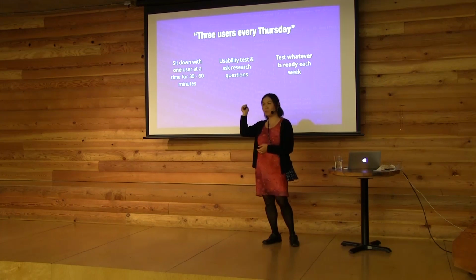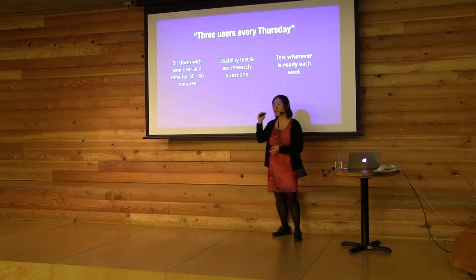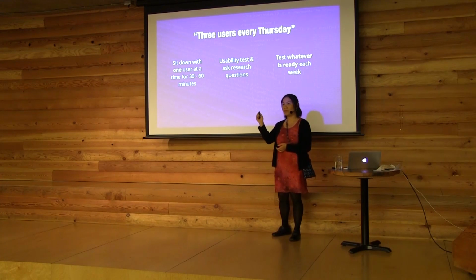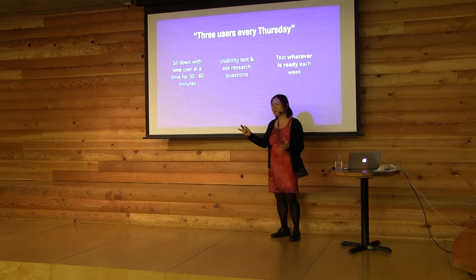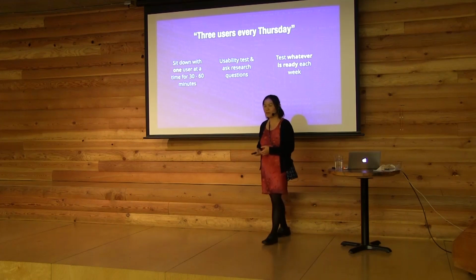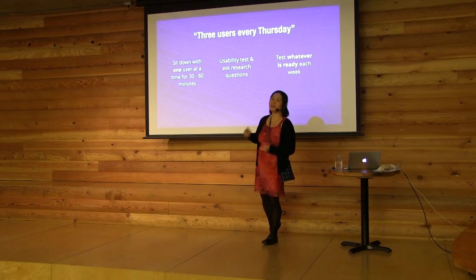And what the Lean UX book suggests is to outsource the recruitment of users, because that's the hard part. It's really hard to design and get your design team working on something, and also be dealing with the logistics of getting people into the office or on a WebEx session or whatever. So they suggest outsourcing that, and that's one of those things that can just make it happen.